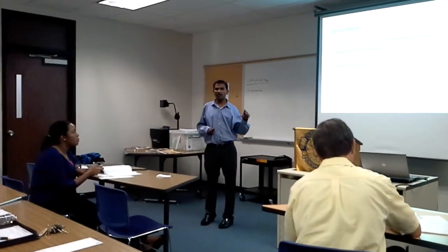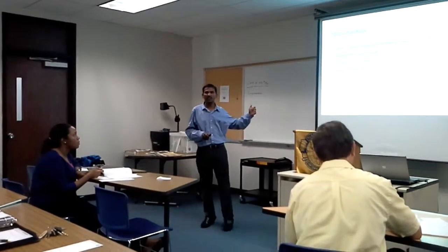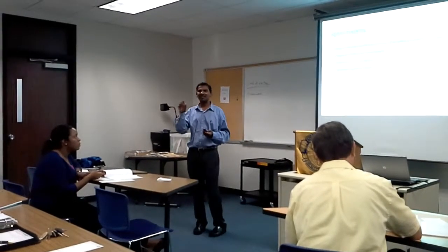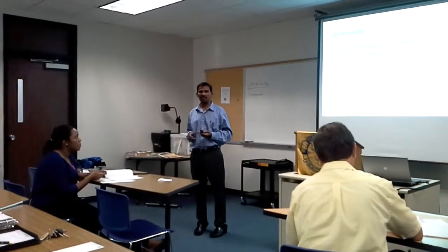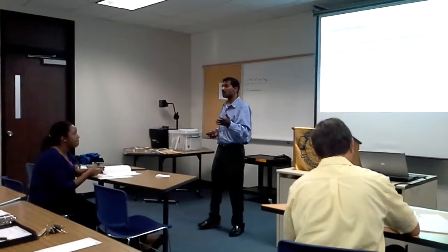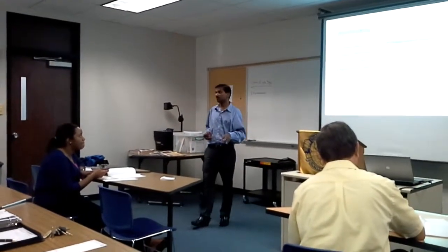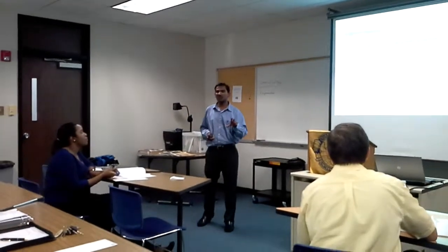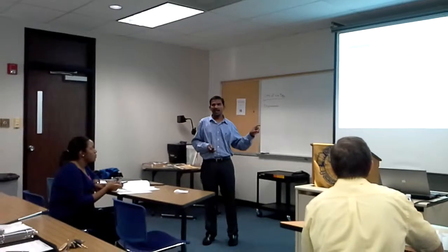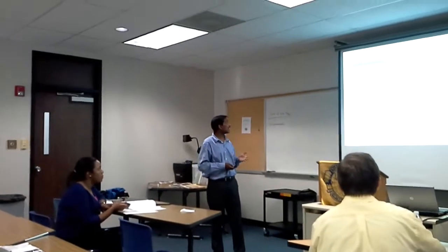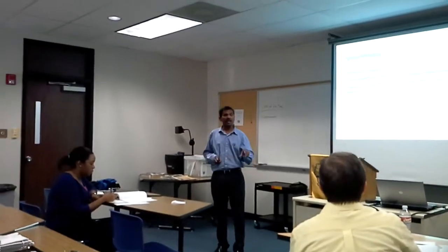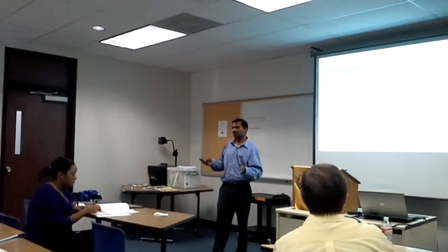During that fixed sprint duration, we identify the subset of items from the product backlog, and you will work on those sprint items during the sprint cycle. In the sprint, you identify the tasks that need to be done within that sprint. Usually the team members will identify the tasks needed within the sprint. Usually the tasks cannot exceed more than 300 within the sprint cycle, and each task cannot exceed 16 hours.